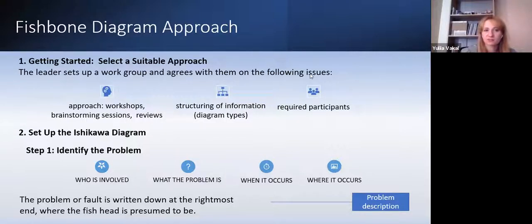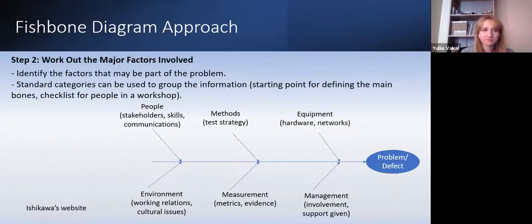Then we need to set up the diagram itself. Again, identify the problem, who is involved, what the problem is, when it occurs, and then we just build it like this, just like a head of fish. And again, the problem should be stated very clearly. That's the important thing.